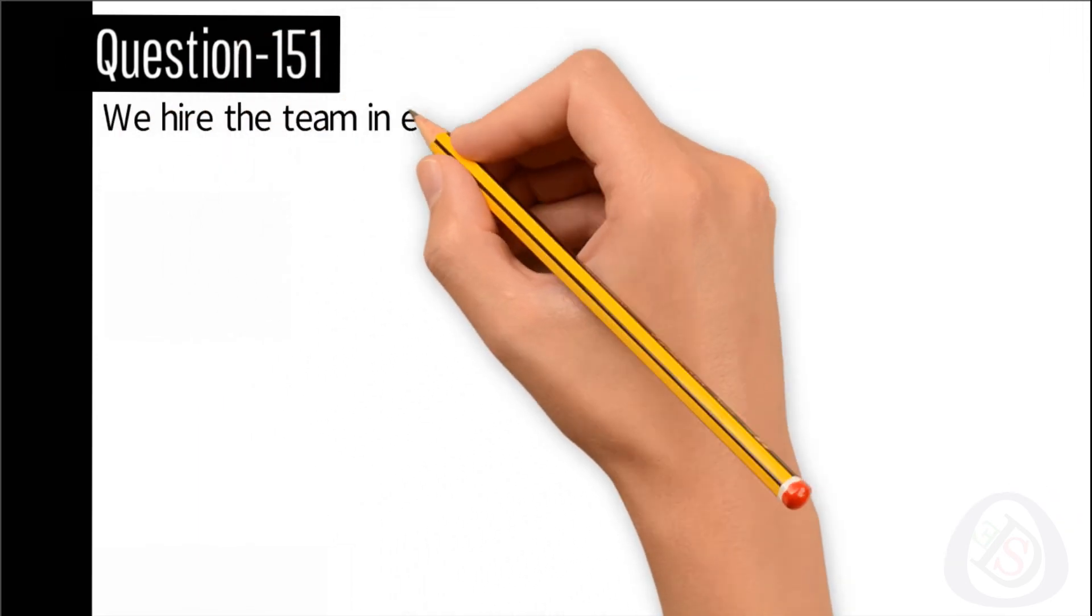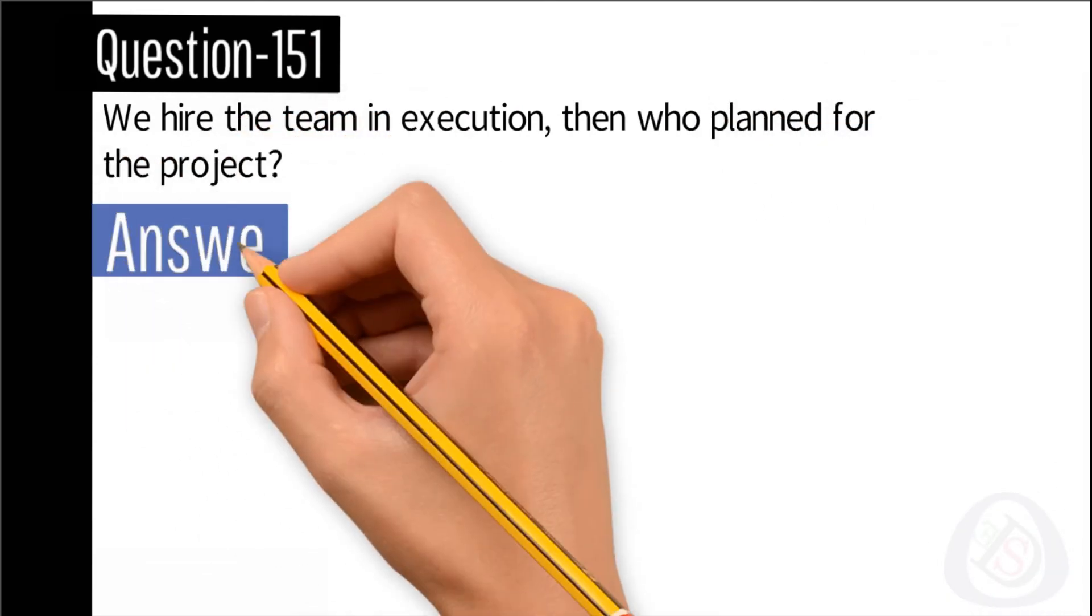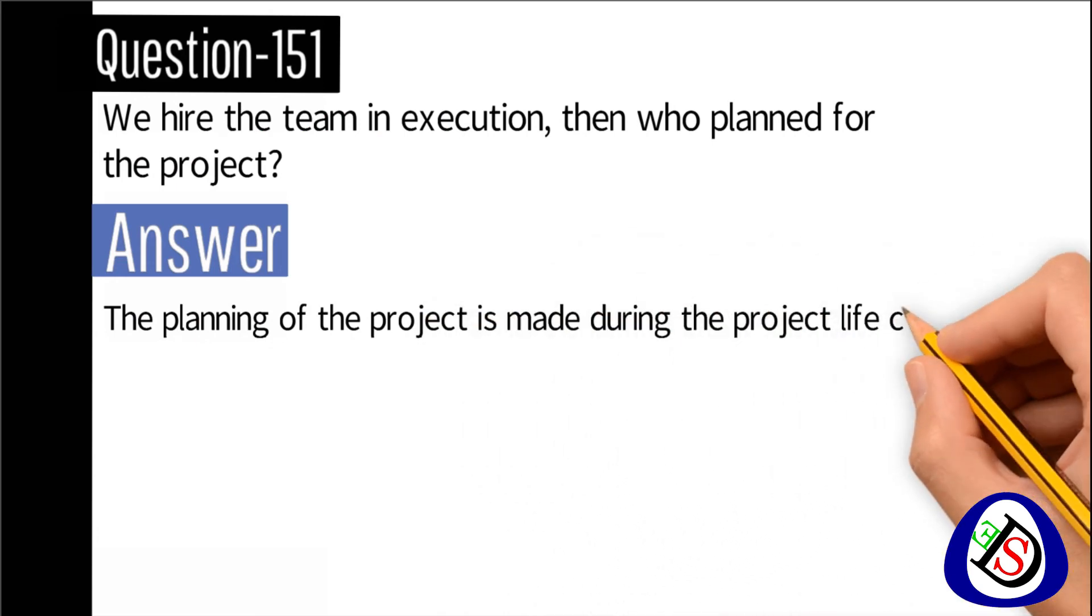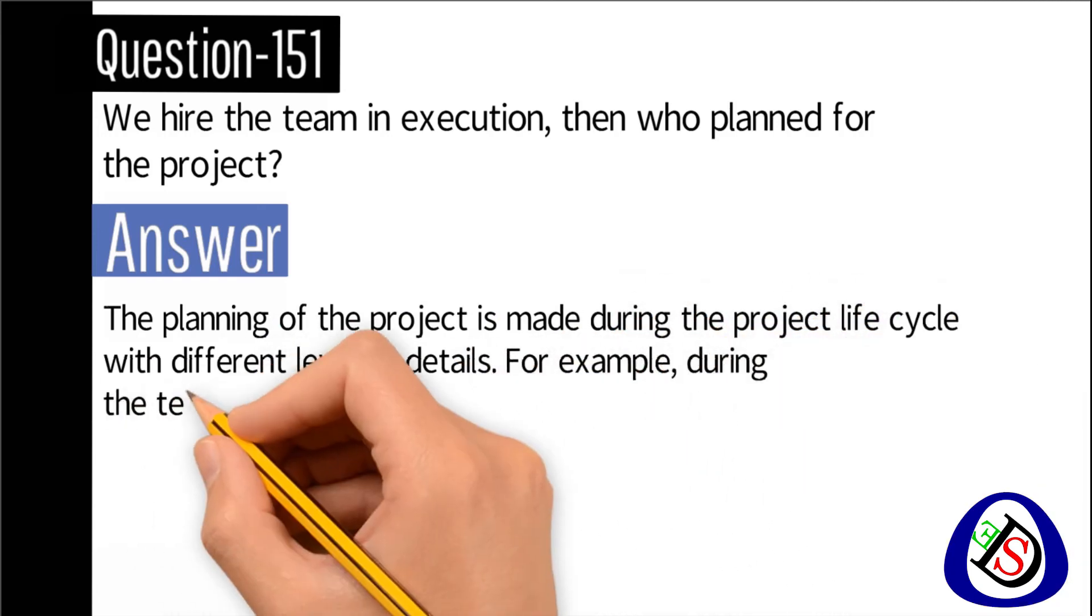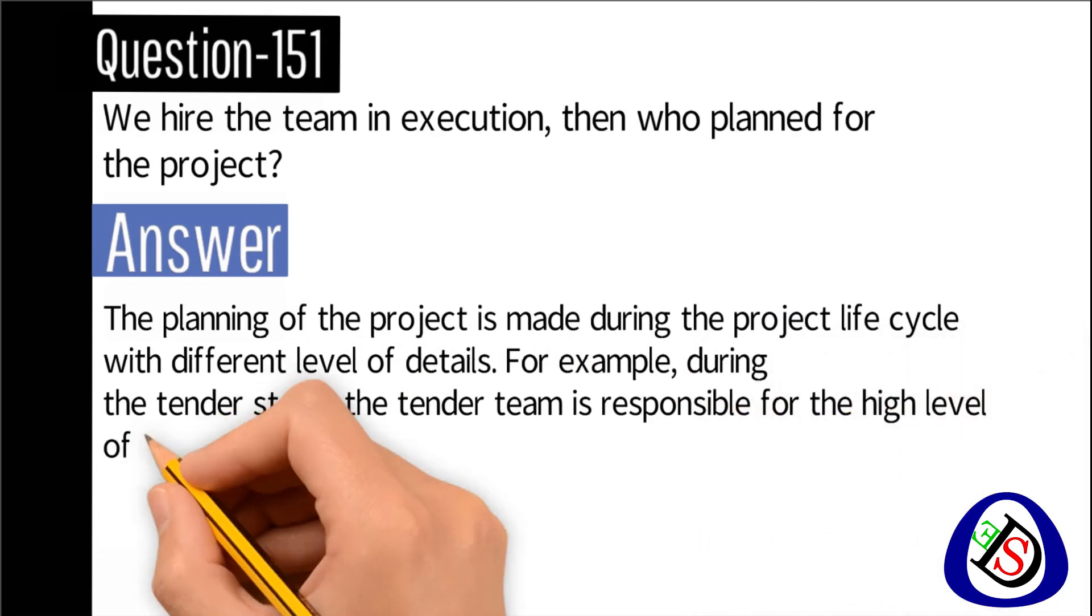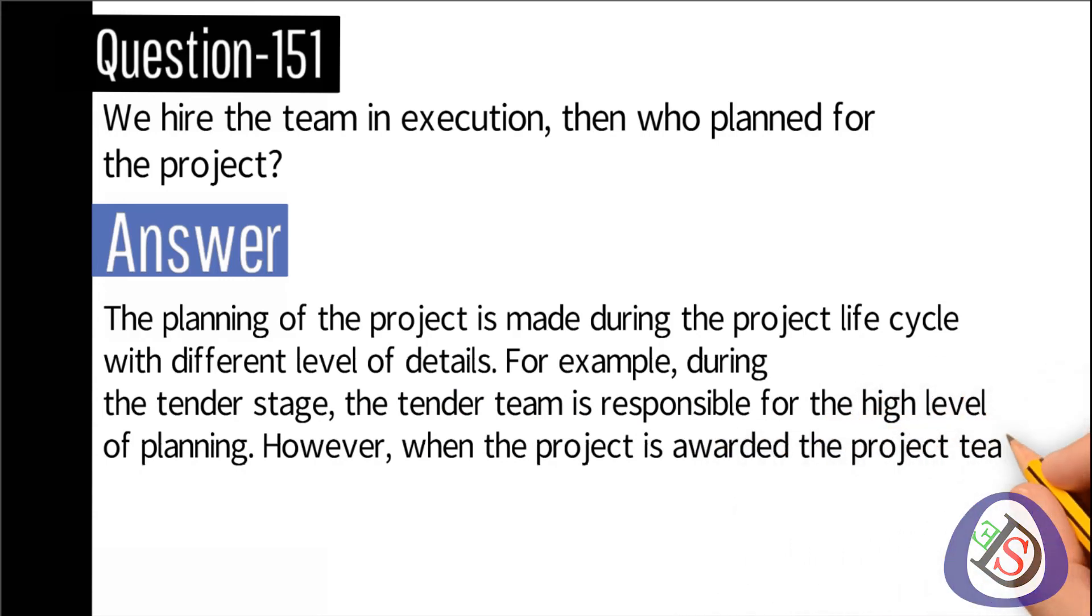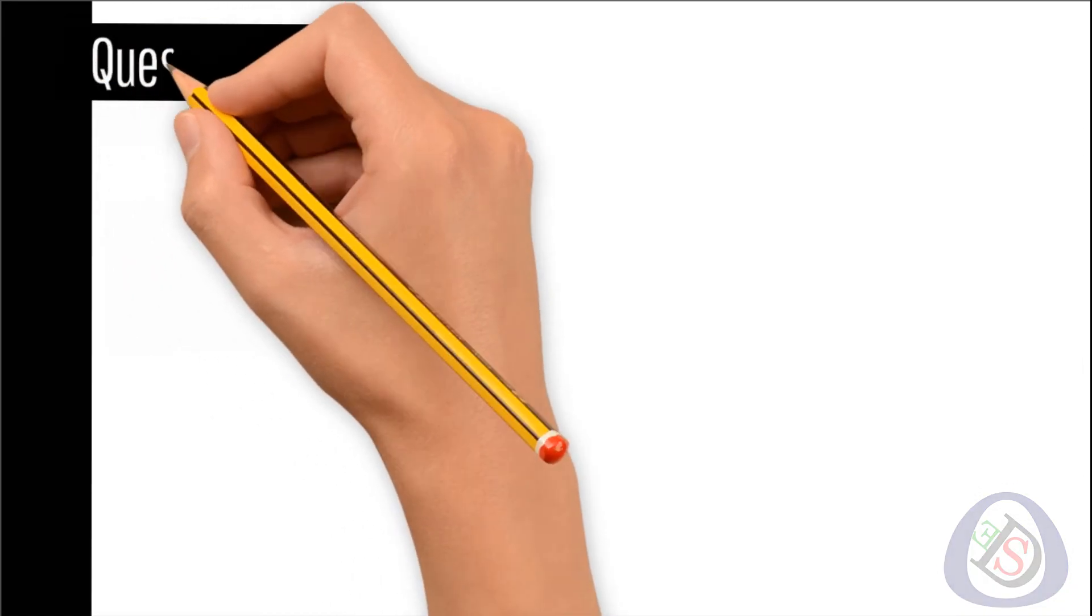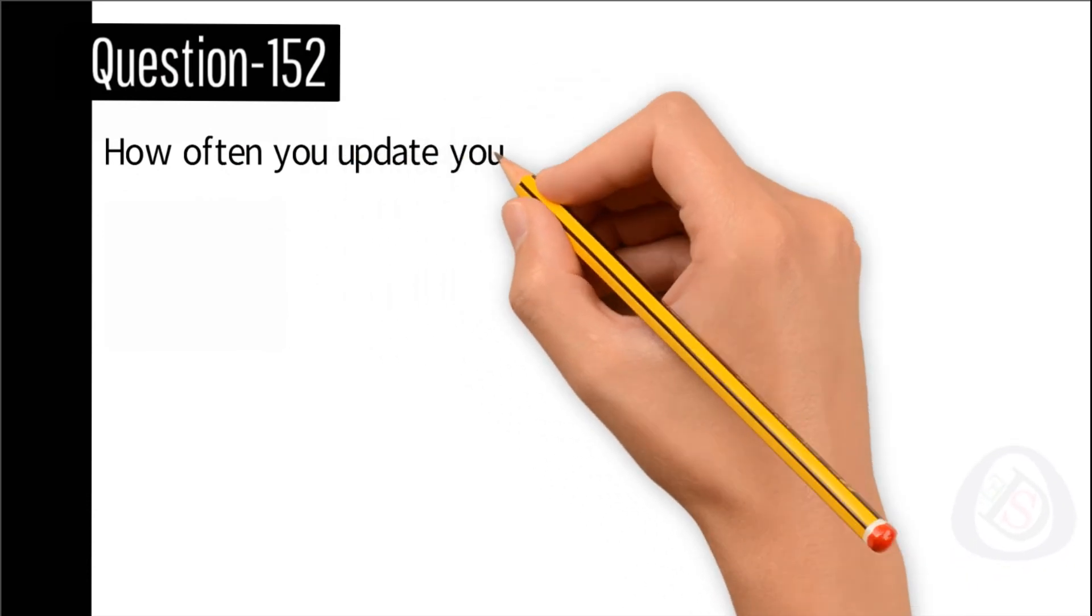Question number 151: We hire the team in execution, then who planned for the project? Answer: The planning of the project is made during the project life cycle with different levels of details. For example, during the tender stage the tender team is responsible for the high level of planning. However, when the project is awarded, the project team is responsible for the planning and breakdown.